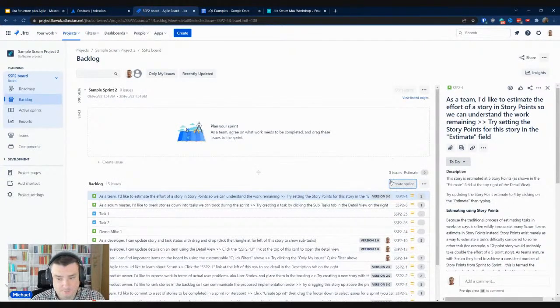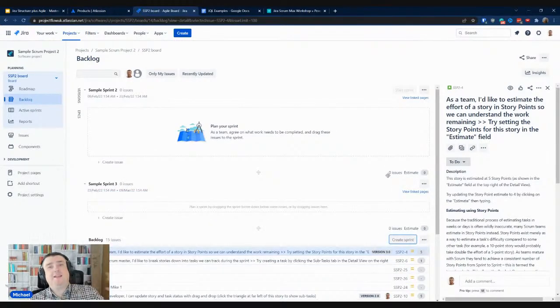And another quick thing, if you are creating sprints, don't stop on one. Yeah, you can create many. Of course, don't go too crazy and go like 50, 60. But in my opinion, up to 5, 6, depends, of course, on the arrangement between the product owner, Scrum Master and the Scrum team. I think adding up to 3-4 sprints is going to work absolutely fine.